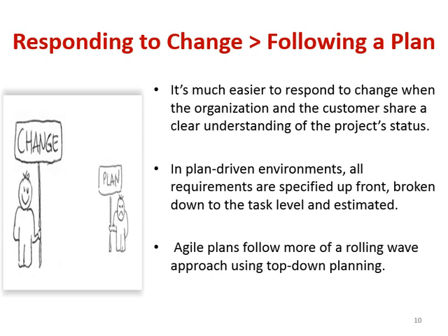The second is, in plan-driven environments, all requirements are specified upfront, broken down to the task level and estimated. So when the plan is driven, when the requirements are not finalized and you still make a plan, definitely your plan is going to change once we have more details of the requirements. So once you proceed with each and every iteration, your planning will be modified and an enhanced version will come.